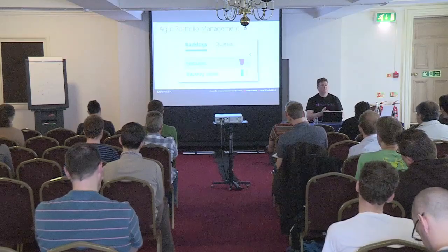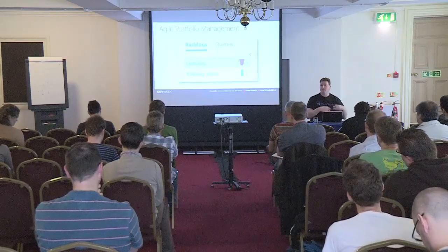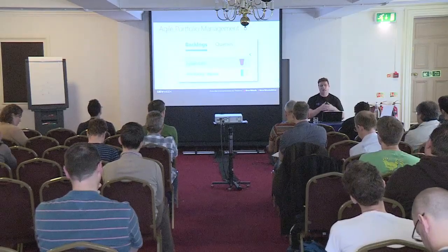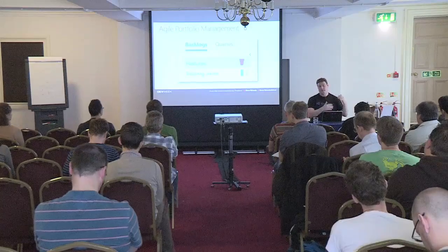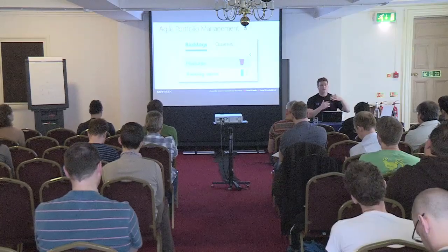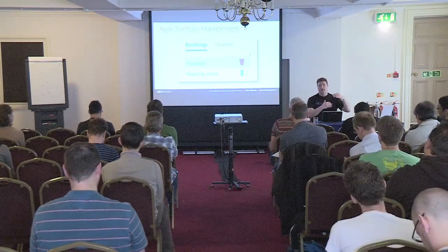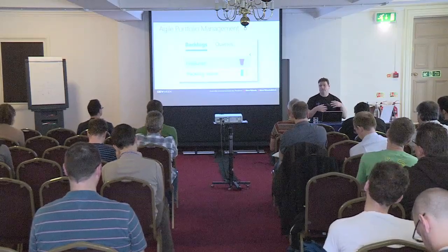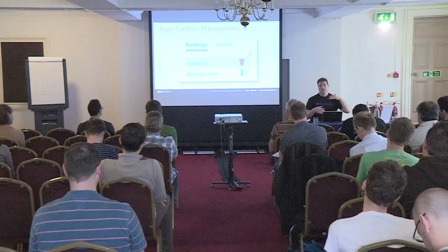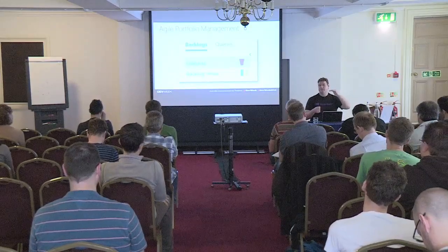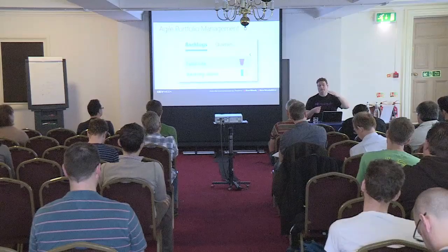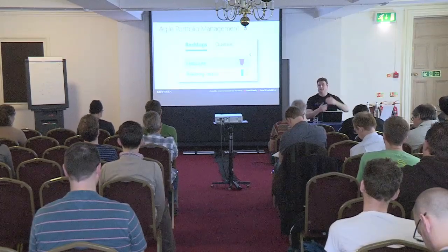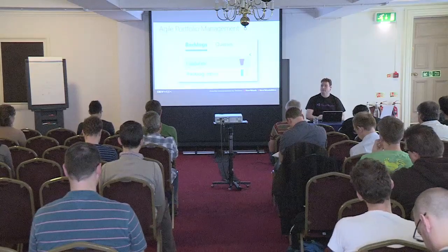So Agile Portfolio Management is really support for epics and things above product backlog item. That's been added into Team Foundation Server, and you can customize that and have up to 5 levels above product backlog item. For example, the Scaled Agile Framework has an investment theme breaking down into epics, down into features, down into product backlog items. So it has a few different levels, and you could customize it to reflect that.